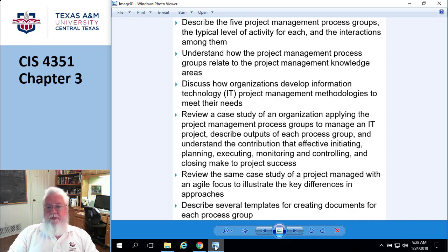And this is typically where you choose a methodology, and I'm going to hold off discussion of what we're talking about until a little bit later. But when you're doing planning, you can say, I think this is a project that is so tried and true and been done so many times that we could afford to use this methodology. Or it could be, this is kind of weird, we've never done this before, I don't really know where we're going, so let's use this other methodology. So you usually pick that in the planning stage.